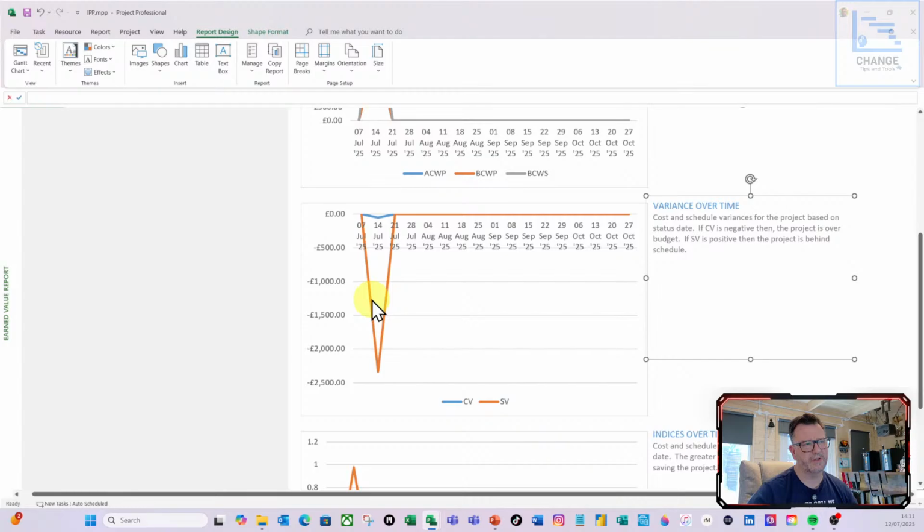So it's saying it's going to cost a little more. Remember, we've got certain projects where their daily rate goes up, from the previous live streams. So if we're pushing those activities out, it means they're going to be at a higher cost. So that's why our cost is going to be slightly higher.